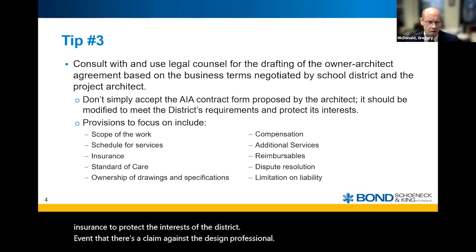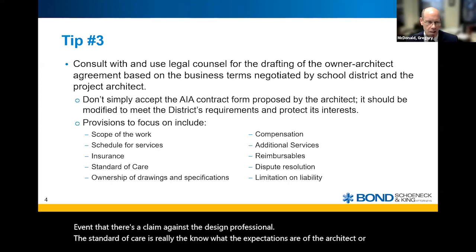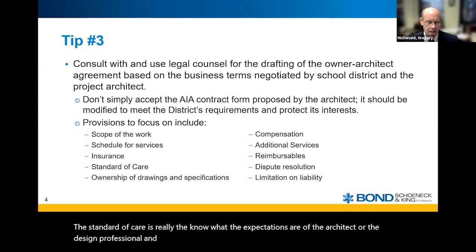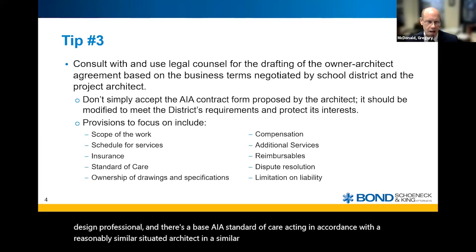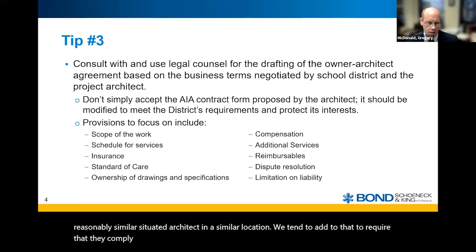The standard of care is really what the expectations are of the architect or the design professional, and there's a base AIA standard of care, acting in accordance with a similarly situated architect in a similar location. We tend to add to that to require that they comply with applicable law, including the ADA, in conjunction with their performance.